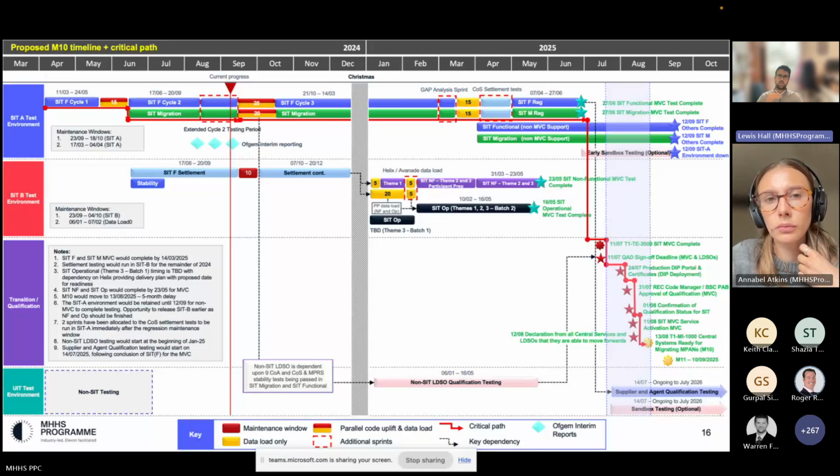They are challenging. They do require increased test improvement sprint on sprint, but I don't think they're at the levels that perhaps previously were being looked at when we were trying to hold M10. So we do have confidence in those targets, and we do have confidence that sprint testing will get quicker. Whilst it might not follow the hockey stick trajectory, we can see from sprints 4, 4.1 and 4.2 specifically that a number of cohorts are getting quicker in their execution, which suggests improved system stability, addressing central party defects that might have been there in early testing.